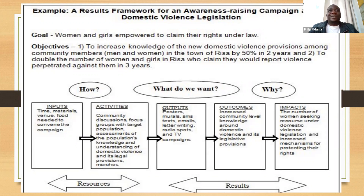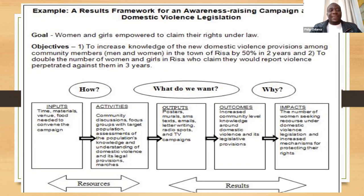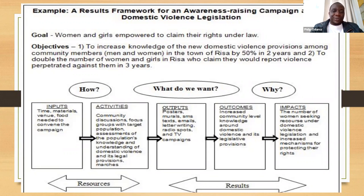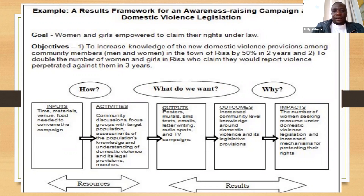When you're planning, you normally start from the top going down. You can never have inputs before you know which goal you'd like to achieve. In developing the framework, you're advised to start with the goal, then after defining the goal you develop the objectives, then define the desired impact, then develop the outcomes, then go to outputs, then activities, and then the inputs. So you plan from top down, but then implement from the bottom going upwards.